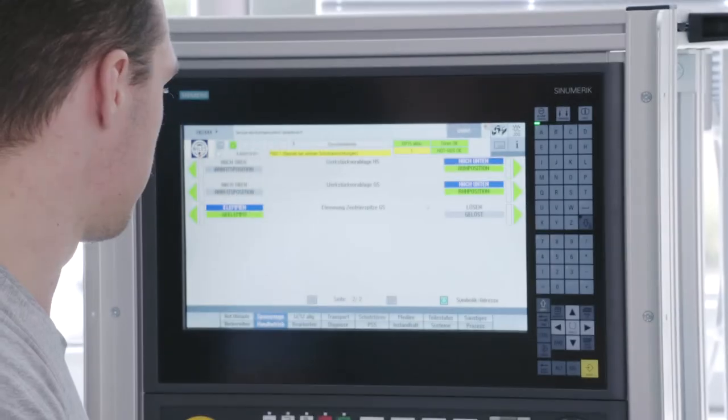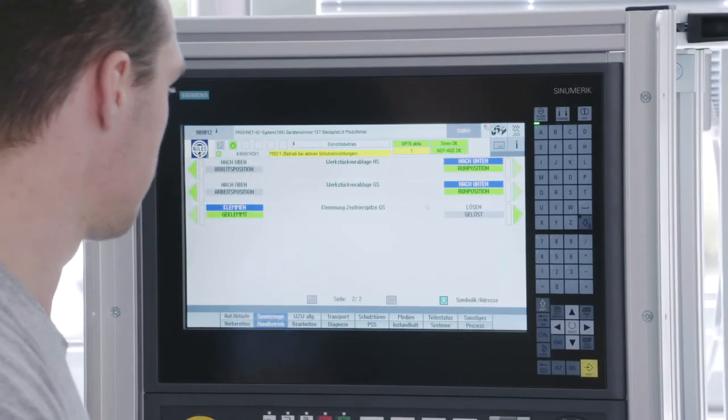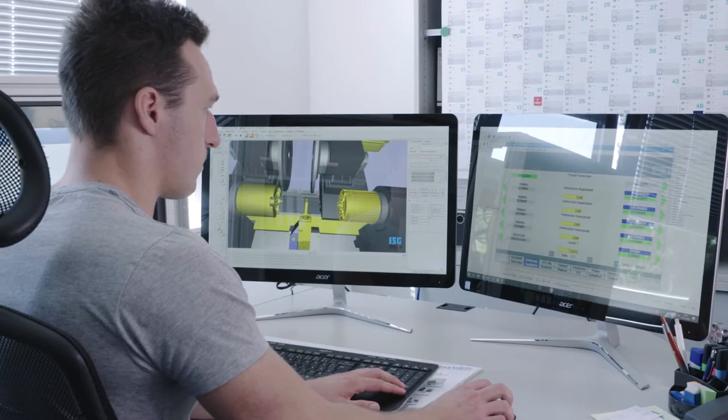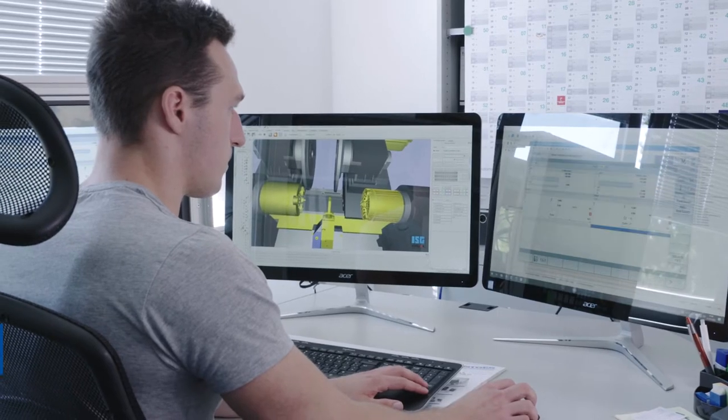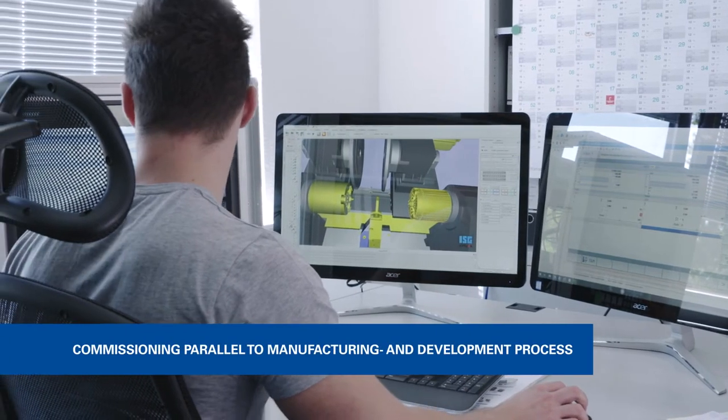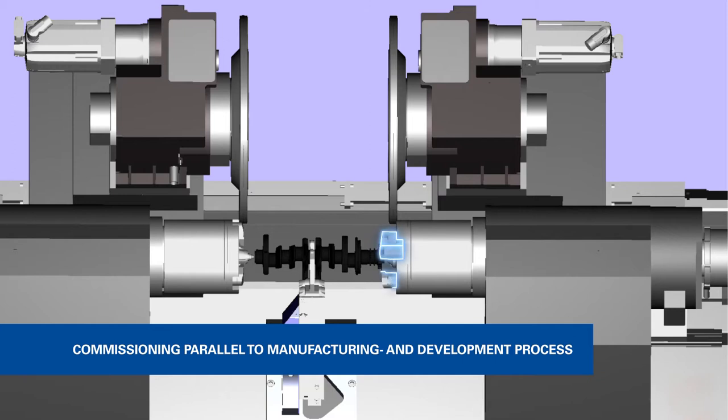When connecting virtual machine models with real or virtual controls, the virtual commissioning can already start in parallel to the manufacturing process of the machine.